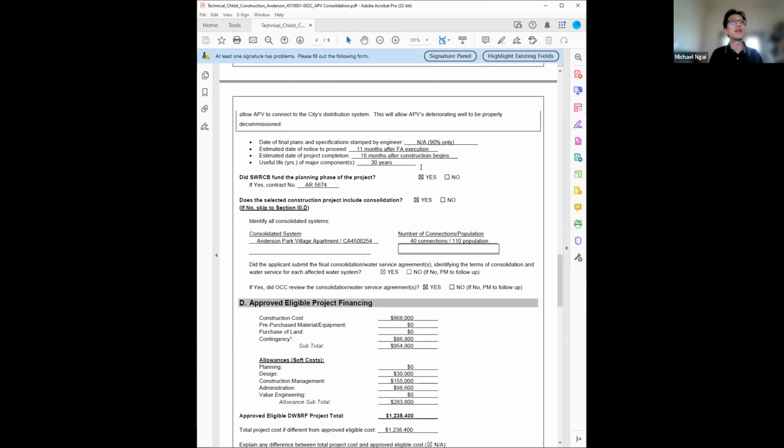The more info that you can give me, the faster I can do my work. Usually we would want the date from the funding agreement execution, because that is when the reimbursement can happen. So that's when I want to start, and any money involved would start from that day on.